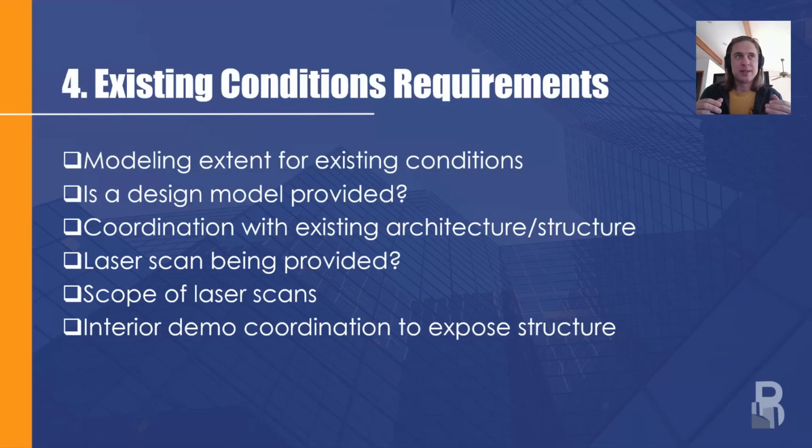So that point cloud can then be brought into the modeling space that's being used for BIM coordination, and coordinated around, clashed against all this good stuff. So even with the point cloud, there are some general contractors that are going to require some modeling of existing conditions, existing to remain specifically, in order to coordinate around those items.